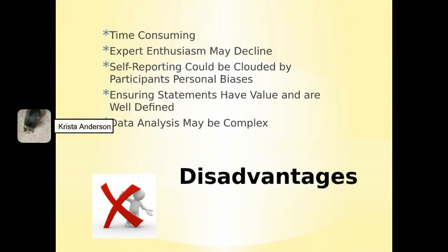While Delphi technique has several advantages, some aspects of the tool may be a hindrance to a project. The tool is very time-consuming to employ. From the creation of the questionnaire to the multiple feedback collection rounds, Delphi technique takes time to complete. Because the process is long, the expert's enthusiasm and willingness to respond to the questionnaire may decline over time. Another disadvantage to using the tool is the self-reporting done by the experts. The personal experiences and biases of participants could cloud or influence their feedback.